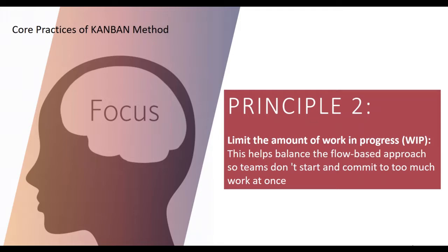The second principle is that it limits the amount of work in progress, which means encouraging the team to complete work at hand first. A key aspect of Kanban is to reduce the amount of multitasking that most teams and knowledge workers are prone to do and instead encourage them to stop starting and start finishing.